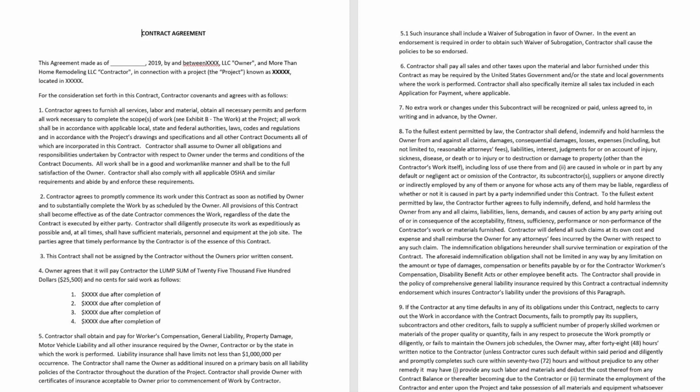And if you're trying to GC something on your own and hire multiple subs, that's really where you've got to be specific. Because as an example, who's performing the caulking around your toilet? Do you have someone else coming, or is the plumber doing it? If you put up a tile backsplash on a countertop and that gets caulked, is your countertop person caulking that joint, or is your tile guy caulking that joint? If you've ever dealt with unions, which I've done in the past, ask who installs a microwave. Is it a carpenter, an electrician, or an HVAC guy? That's an interesting one.